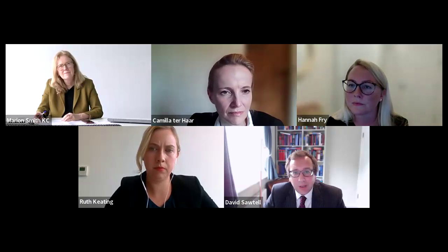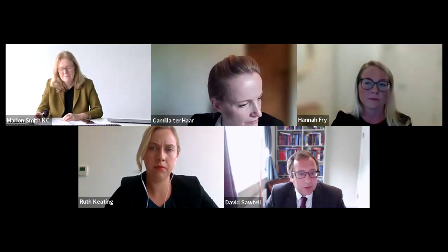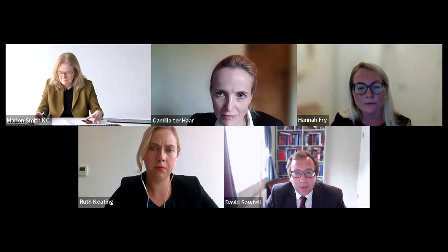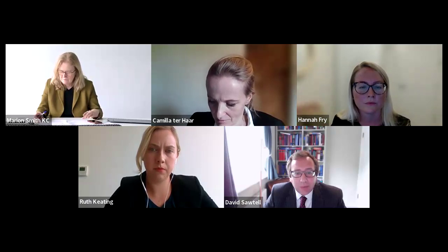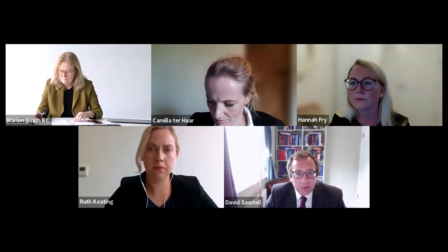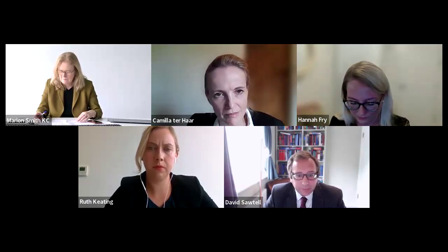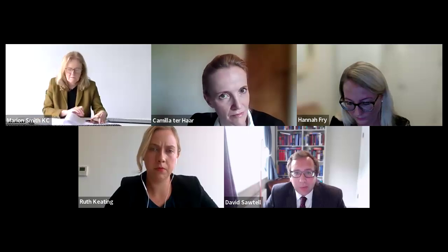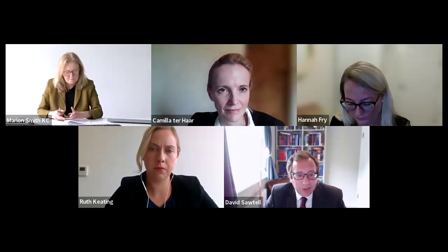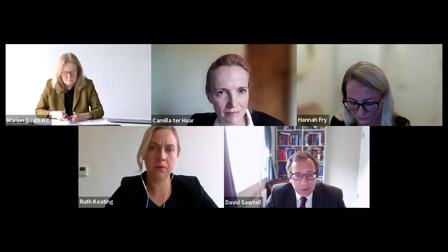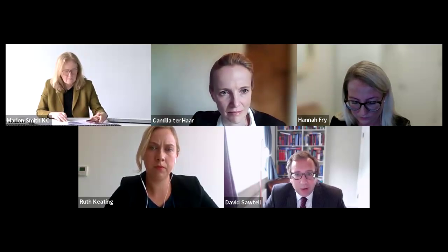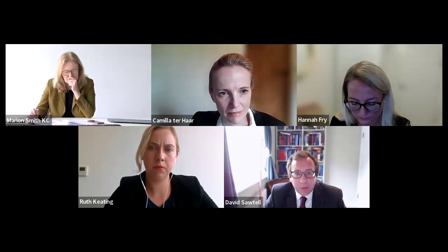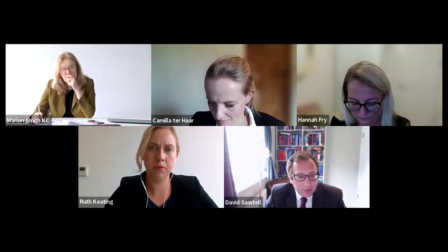You have a very, very light amendment to clauses 2.17.2 and 2.12.3 to reflect the new Section 2A of the Defective Premises Act 1972 to include a reference to work in relation to a dwelling, so not just conversion or creation of a new dwelling. And where you see in clause 3.16 previous references to the CDM regulations, that now extends to Part 2A of the Building Regulations 2010. And this, in my opinion, is actually rather dangerous because it suggests that you can elide those two regimes, where in fact, although they're complementary, they're not identical.